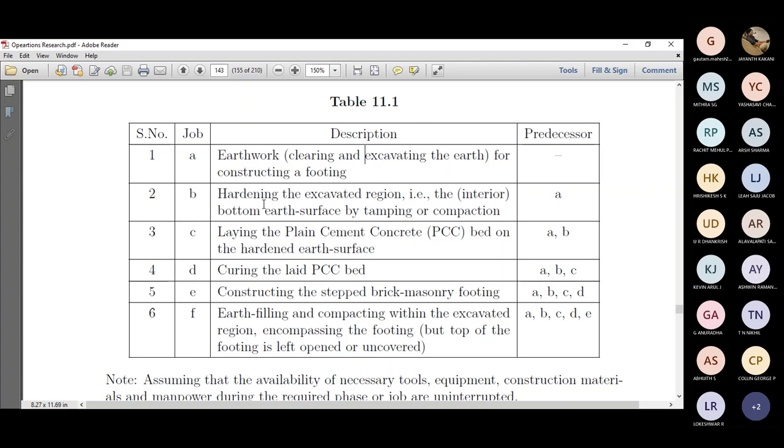So 25 activities - I say minimum is 25. So the upper limit is not there. You can really describe a beautiful project with a lot of complexities and activities. Then you form relationships, predecessor and successor relationship. Then you form duration. Then you do a network diagram. Then you solve that using critical path method with all inclusive, like total float, free float, independent float, and interfering float. And also find out subcritical paths also. So entire CPM is the assignment number two.